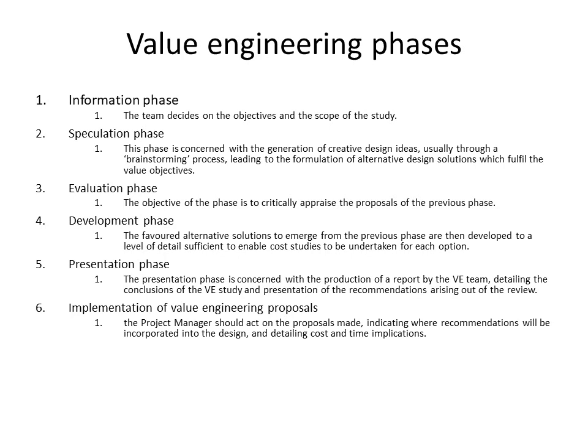So how do we do value engineering? We need the information phase, we need the speculation phase where we get the ideas together, we evaluate proposals, we develop the favoured solution. The presentation phase is concerned with the production of a report by the VE team detailing the conclusions of the study, and finally we implement the VE proposals.